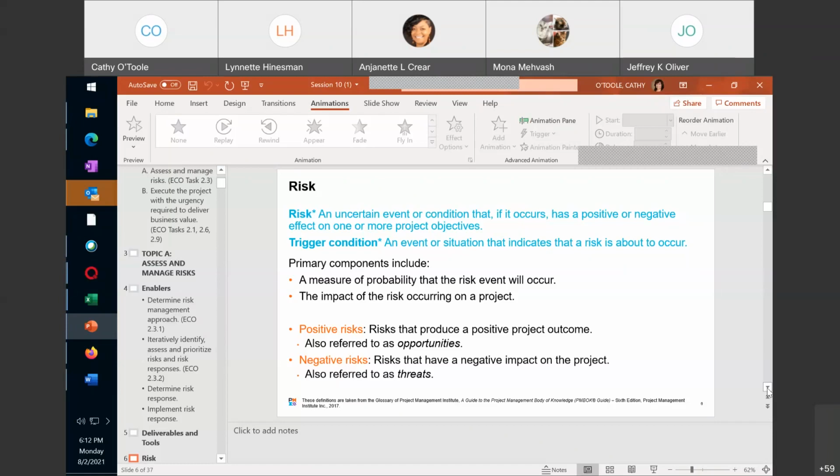So when we're thinking about risks to projects that we're implementing, one of the risks that we always consider is the location for where our tax compliance team sits, because it is in places where you can have really terrible weather, like hurricanes and such.